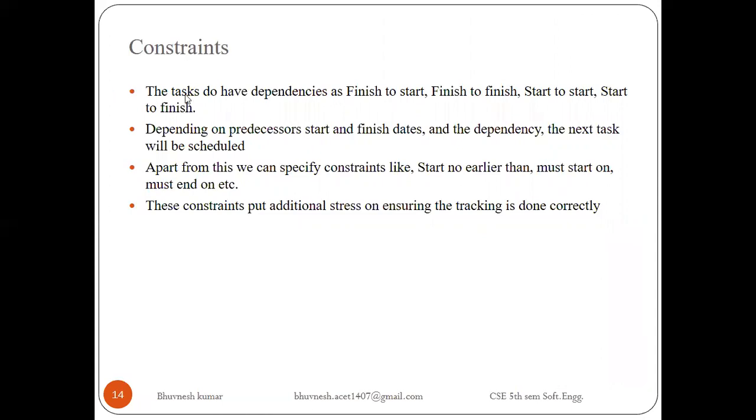That is, the task has a dependency as finish to start, or finish to finish, or start to start, or start to finish. They depend on that. Depending on the predecessor's start and finish date and dependency, the next task will be scheduled. Your dependency will be on predecessors and also on successors.